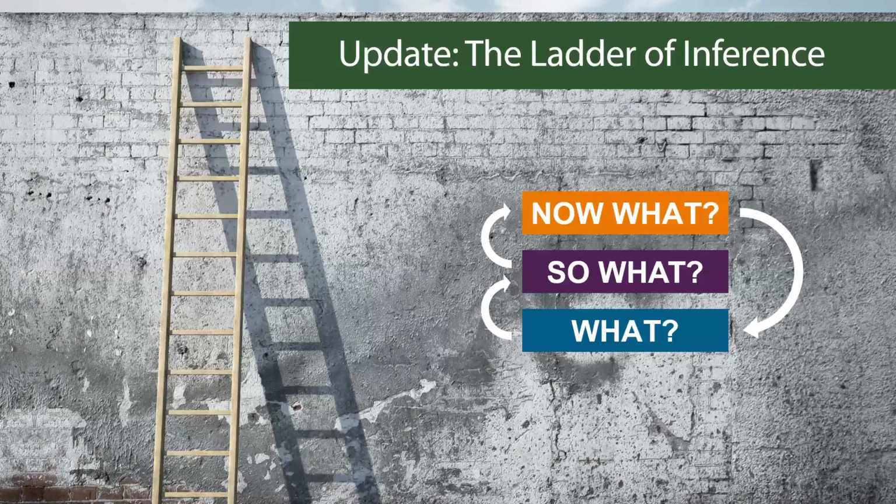The what is the objective, what are the facts. The so what is the interpretive, and the now what is the decisional. So when you think about designing a retrospective, and perhaps you go to some new technique that somebody told you, or this fancy way to build a sailboat and use Post-it notes or whatever, it's important to have this mental model to map it back to and say, are we really going to get the data out so that we can do the interpretive part so that we can make a good decision?